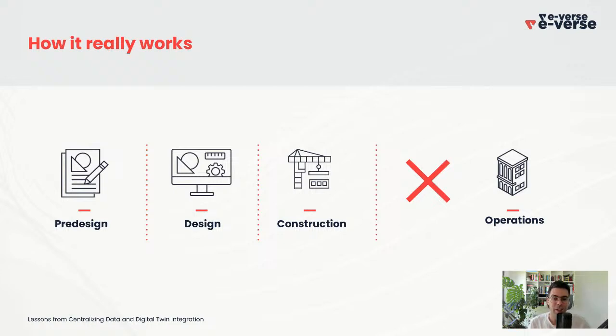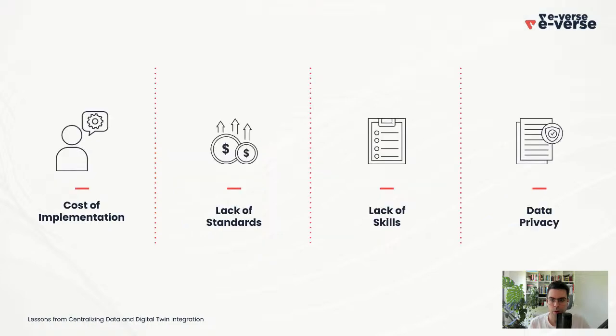So it was insane. So the first lesson learned is you always want the facility manager's guy to be as early as possible in the process. You cannot define a strategy on FM if you don't have your facility manager's guy early in the process. Otherwise, it can happen what happened to us.